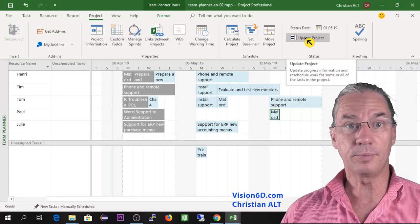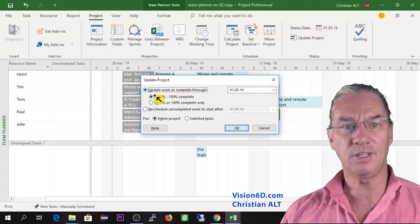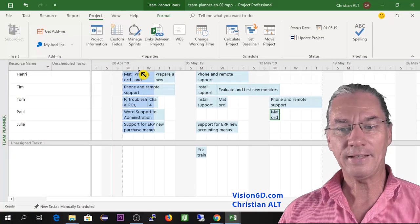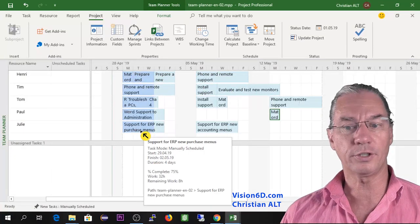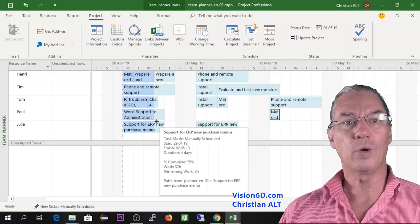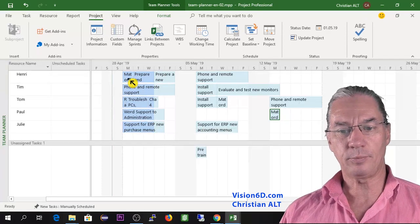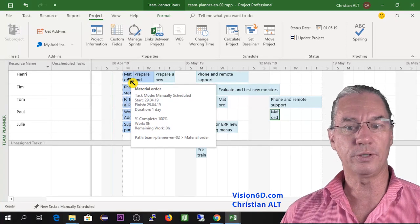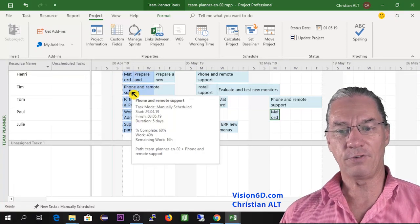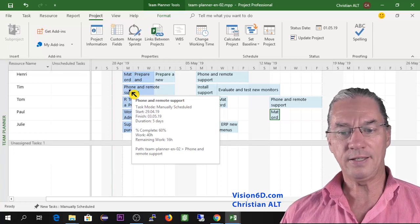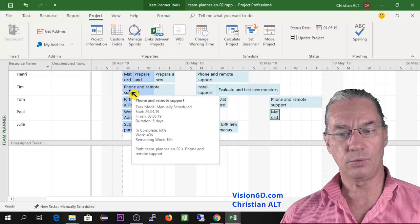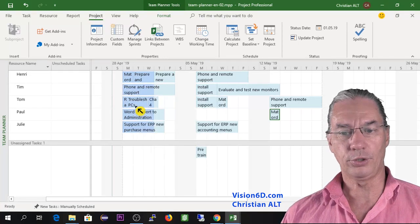Let's admit that everything went well up to that point. We update the project status and say everything went 100% through the 1st of May. At that moment, you see the grey turns to a darker blue — meaning what has been achieved — and clear blue shows what still has to be done. For example, material ordering shows 100% complete at eight hours. For phone and remote support, we're at day three out of five — so 60% done, with the complete work being 40 hours.